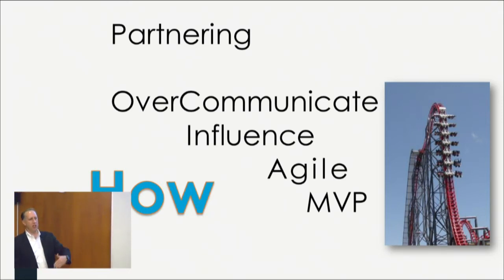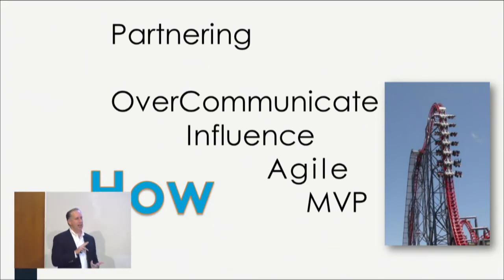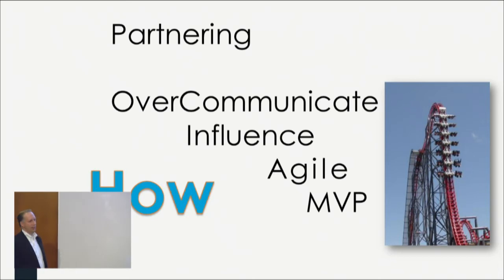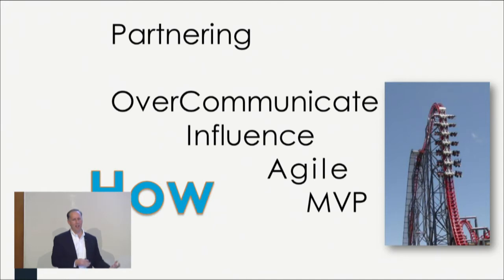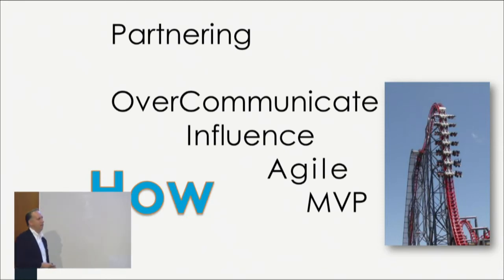But because we communicated constantly, they were very kind in understanding what our challenges were and being very, I guess, forgiving in those challenges. I don't think this works for a professor, but for major companies, communicating as you go, they understand that there are challenges. 30% of projects typically, at a minimum, go over budget and over schedule. So communicating is critical in partnering, finding ways to influence them to help align where you want to go as a company and where they want to go.